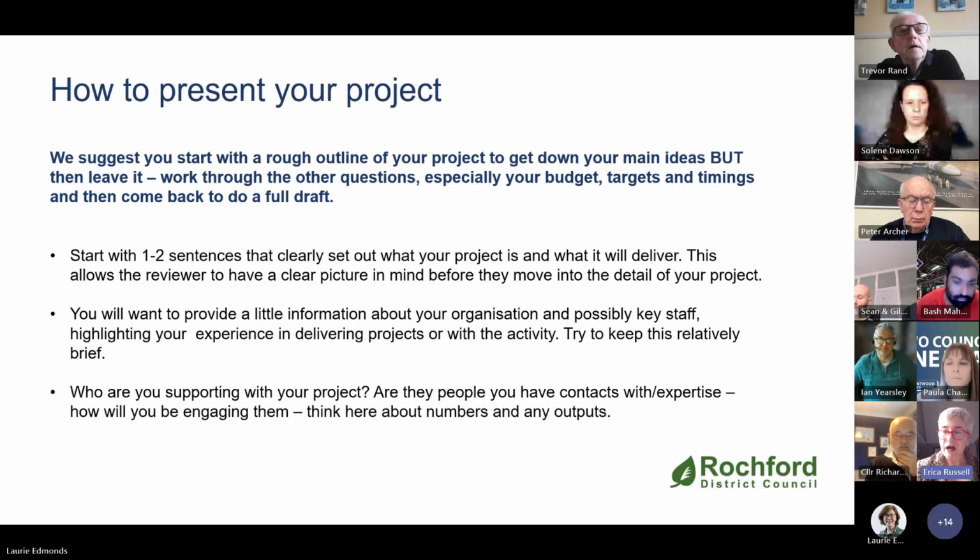One of the things I would always suggest is that when you're thinking about your project, start with a very rough outline, write it down, put down your main ideas, but then I would leave it and start looking at some of the other key questions, especially thinking about my budget, any targets or outputs that I have to hit or I want to hit, and then the timings. And then I would probably come back to do the full draft.